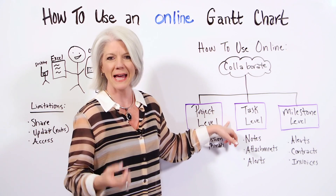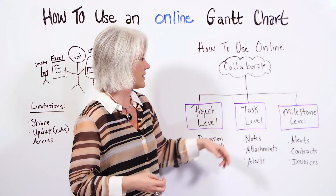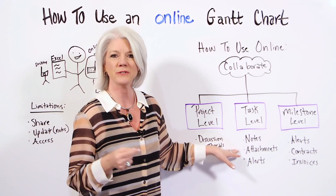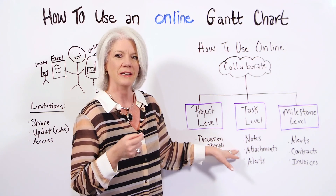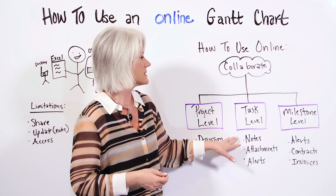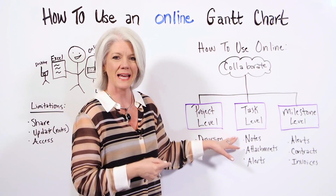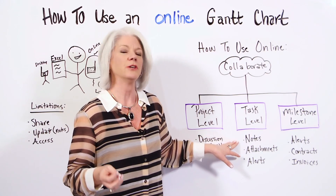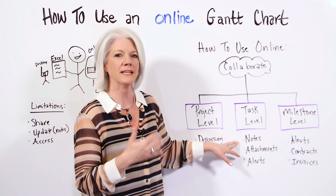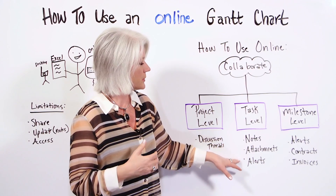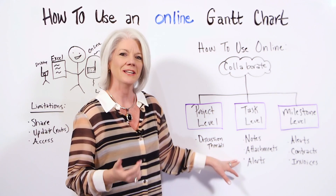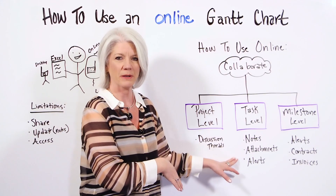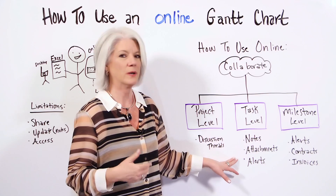The second level is the task level. Online, you can add notes and include different attachments to different tasks. For instance, if someone's working on requirements, you can attach the requirements document. If they're working on testing, you can include an attachment for test case scenarios. You can also include alerts — so if a task happens to be delayed, you can set up an alert, and you can also trigger an alert when it closes.